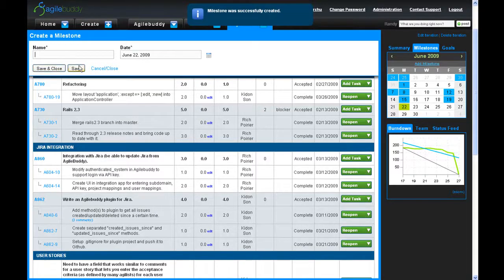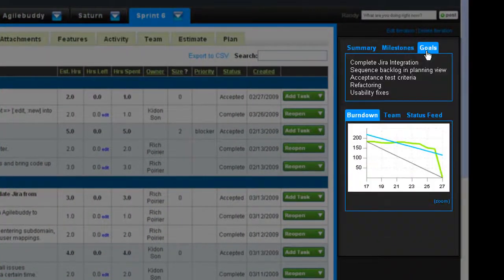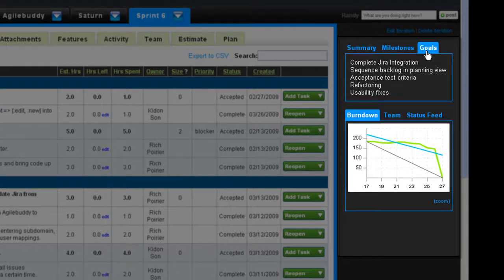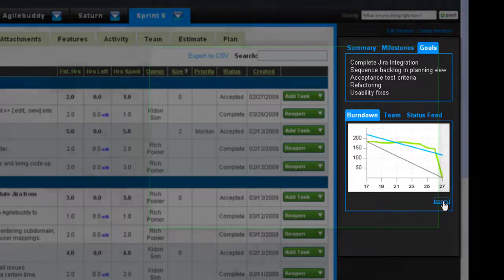The goals tab lists all the goals outlined for the sprint. Below, you have the interactive burndown chart which allows your team to compare their current velocity with their target velocity for the sprint.